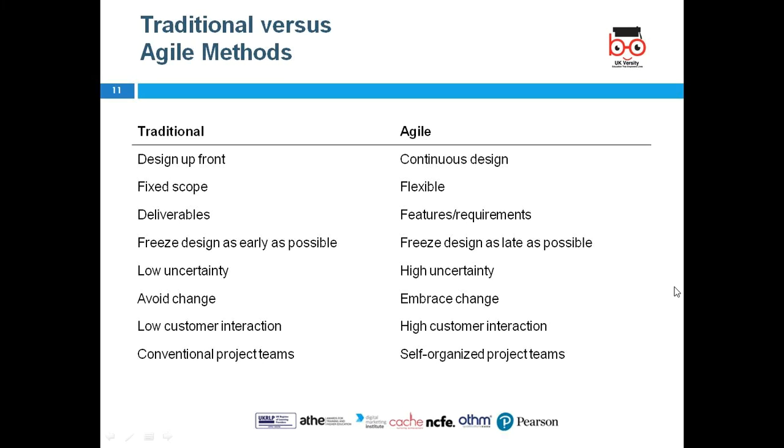In the traditional one, you get a deliverable, which is basically a final product. In the agile, you are delivering feature by feature. For example, at the moment the database creation feature is available. In the next iteration, the retrieval is available, and in the third phase, the update feature is available.